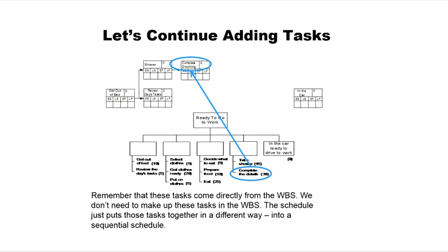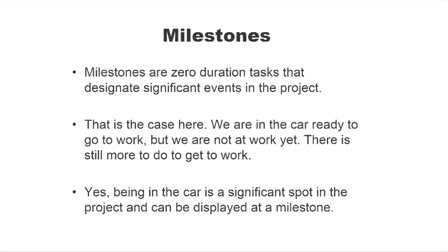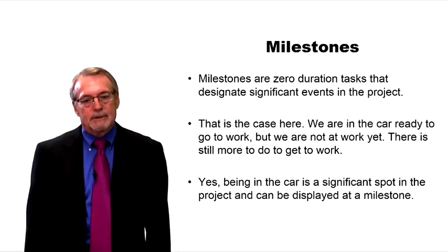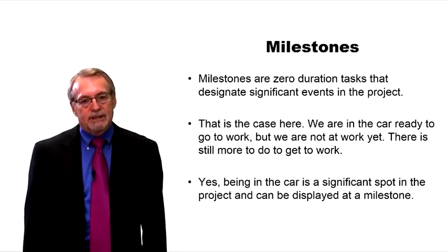A milestone. We noticed that one of the tasks on here, get in the car, had 0 duration. Milestones are 0 duration tasks that designate some sort of a significant point in the project. So here, getting in the car is a significant point in the project, so it shows up as a milestone. It's also a 0 duration task.